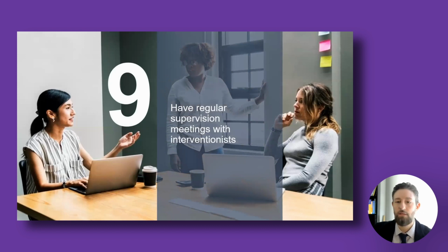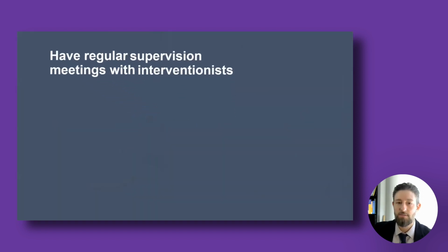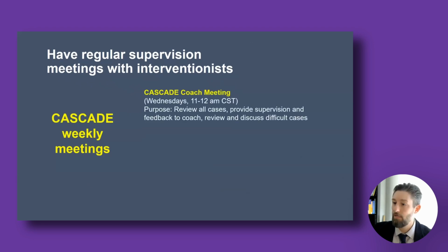So the ninth thing here is I would strongly encourage having regular supervision meetings with interventionists. Here's how I've always structured our meeting breakdown. We have a weekly coach meeting. It just happens to be on Wednesdays from 11 to 12 Central Time, where the purpose is to review all of their participants, provide supervision and feedback to the coach, and review and discuss difficult cases. We also ask what condition people are in and just verify that they're actually getting it. The condition to which they're assigned is another way that one can track fidelity and make sure that the coaches are comfortable with